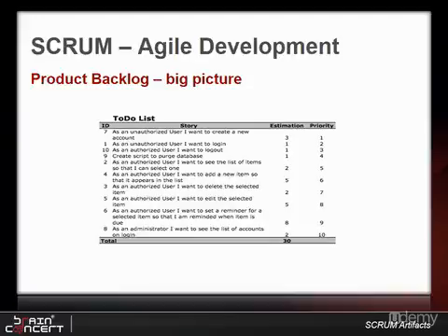This backlog exists and evolves over the lifetime of the product. It is the product roadmap. At any point, the product backlog is the single definitive view of everything that could be done by the team ever in order of priority. Only a single product backlog exists. This means the product owner is required to make prioritization decisions across the entire spectrum, representing the interest of stakeholders and influenced by the team.